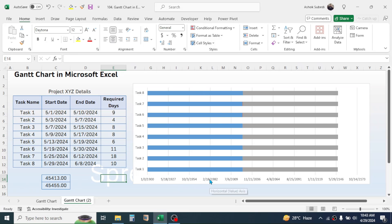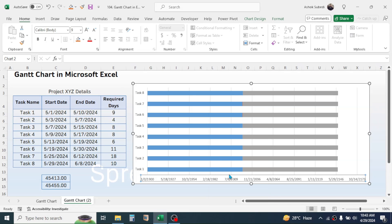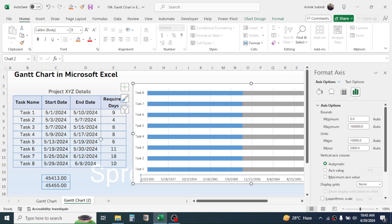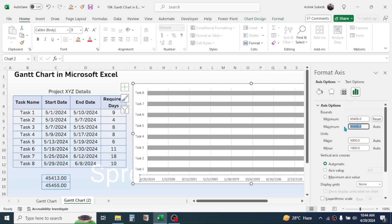Click on the horizontal axis, right-click, and click Format Axis. In the minimum and maximum fields, we need to enter the starting date and ending date numbers. For the minimum, put the number that is five days prior to the starting date, to create space to display the date. Reduce by 5, giving us 45408, so type 45408 in the minimum. For the maximum, add 5 to the ending date number, giving 45460, so type 45460 in the maximum.